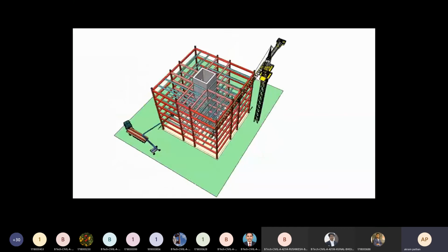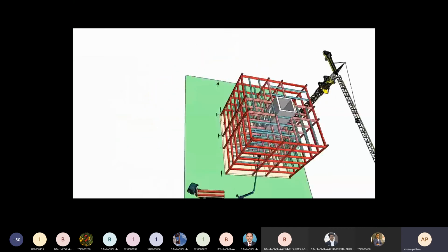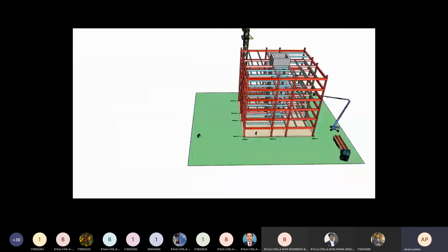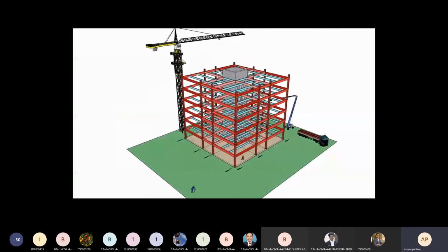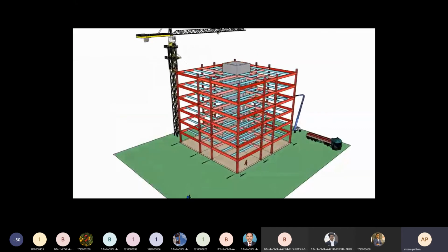Perimeter safety cables are installed at the interior and exterior perimeters of the floor and at openings as soon as the metal decking has been installed.